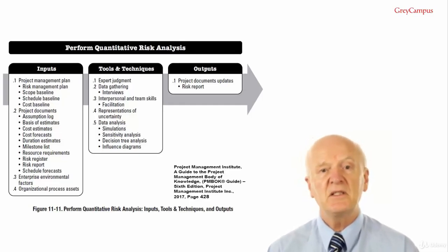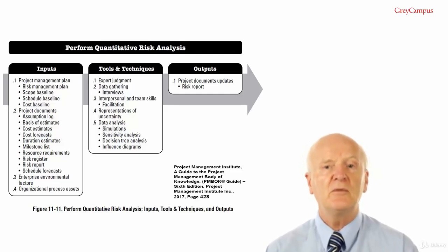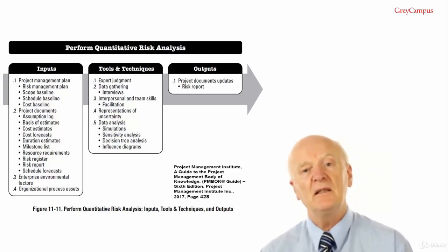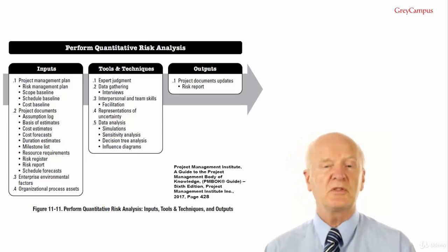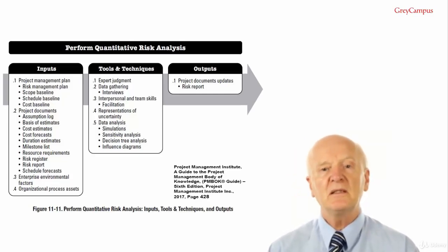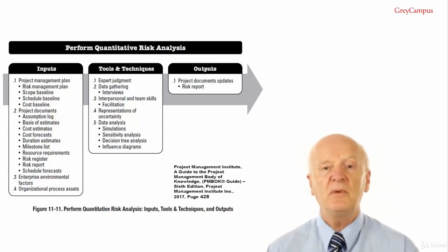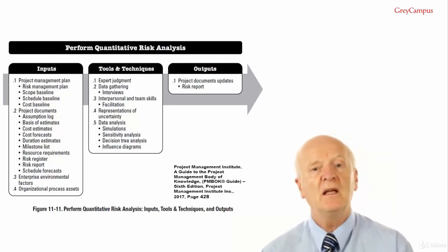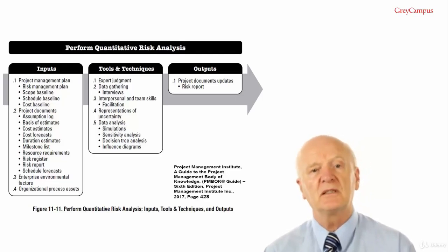And the second one is degree of inherent variability remaining within the project at the time the analysis was conducted, indicated by the range of possible project outcomes. You would expect the inherent variability to reduce to 0 as the project nears completion, because there can't be any variability when it's completed.